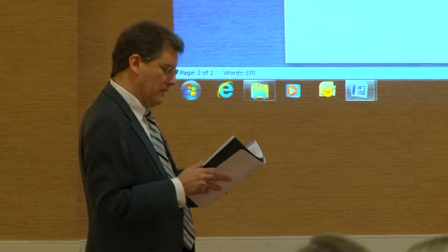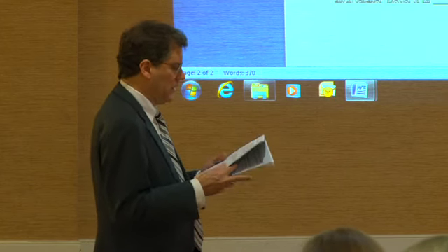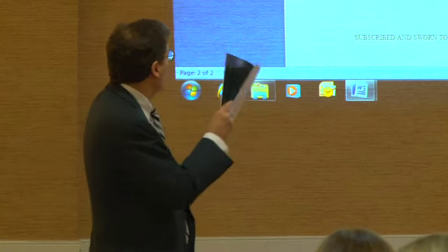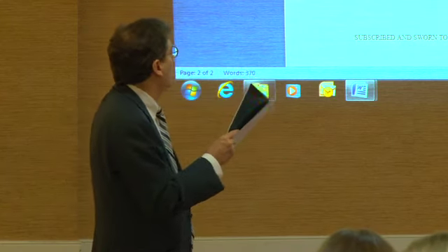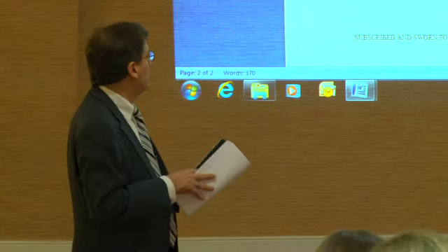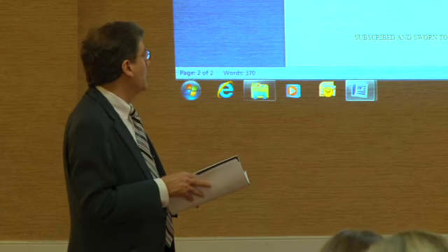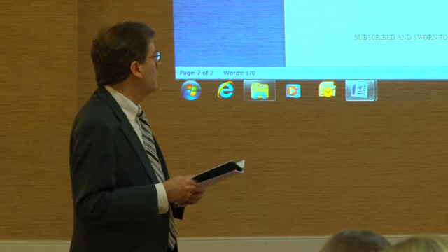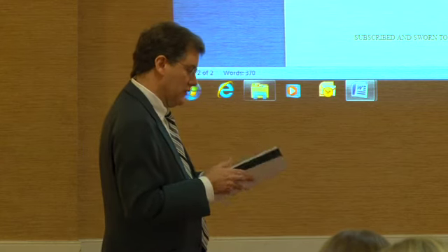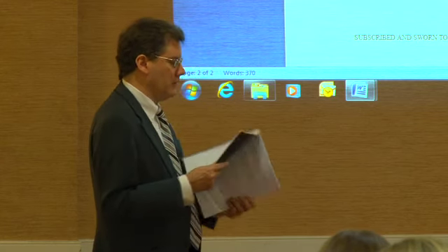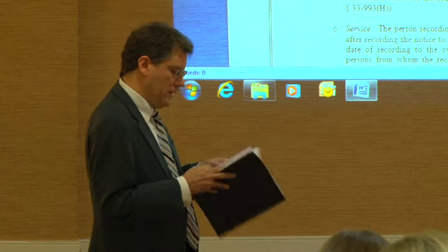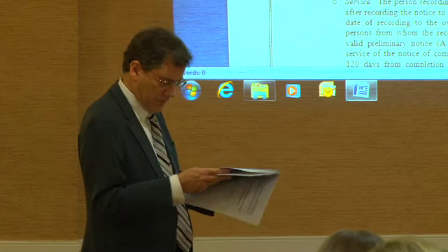nature of improvements. And then if you turn over to page 13, it explains that, hey, this is for purposes of shortening your period to record a lien claim by matter of law from 120 days to 60 days. And then there's a verification from the owner or an authorized representative, such as the general contractor, that I sent this out to everyone. All right, let's turn back to a description of what these notices of completions do, and that's page 7.